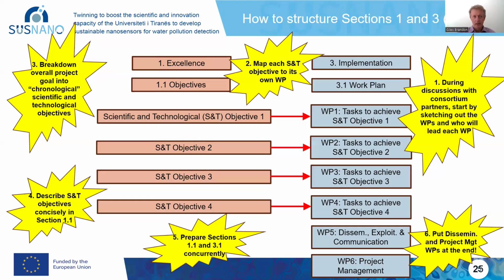This is our expertise. In essence, what they're saying is that they're positioning themselves for a role as a work package leader. And this is great. This is fine. This is what you want to hear. So during those discussions with the partners, work out what these work packages are and their corresponding objectives, work out who the natural, obvious work package leader is for each of those. So I've discussed at 1, 2, even 3, so yeah, repeating, make sure these objectives and work packages are roughly in a chronological order.